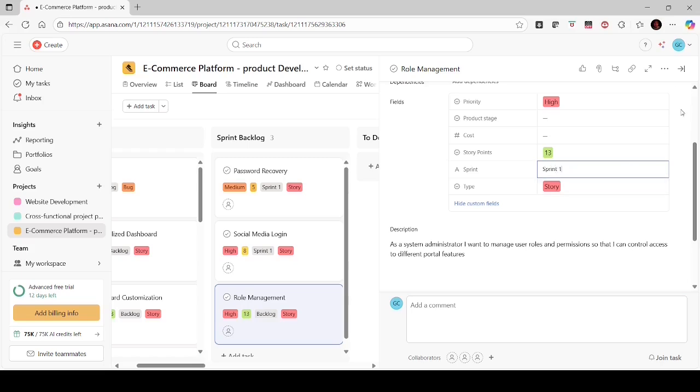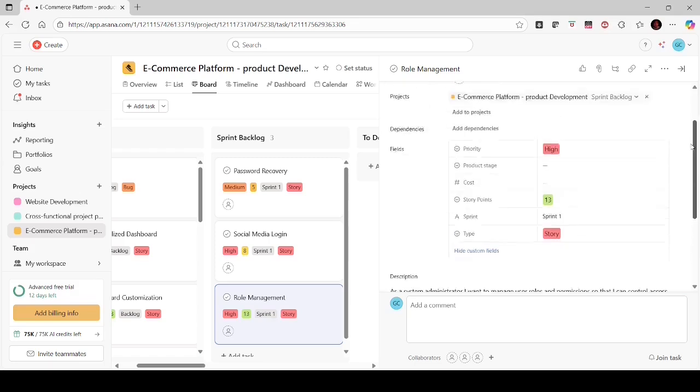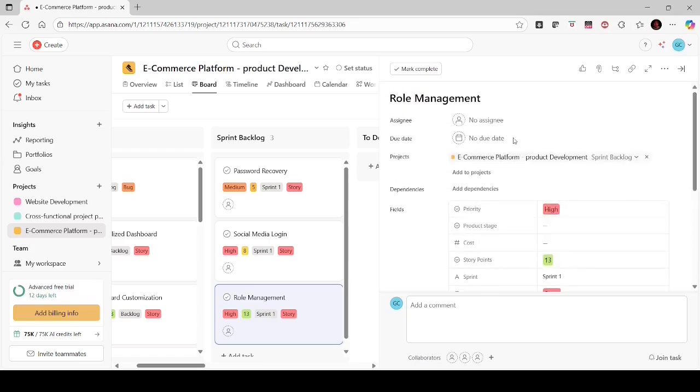Okay, and also during the sprint planning meeting, other things like which task will be assigned to whom, that also we need to identify. All the details should be populated at the end of the sprint planning meeting for all of the items which are picked in that corresponding sprint, so that when we start the execution of the sprint on daily execution, everything will be available in front of us.